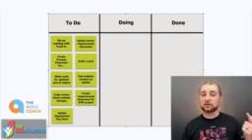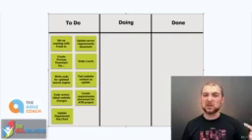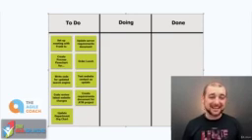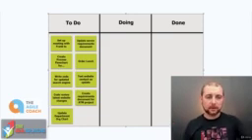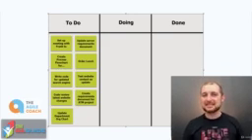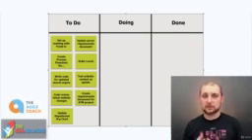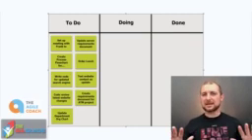They house details of what that work item is, maybe when it's due. Obviously, the status is derived from the column, so that's not usually noted directly on the card, but it's in the particular column for that status, as well as any dates and times that that particular card has moved from one status to another. So let's take a step back.